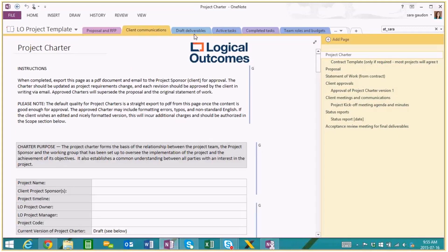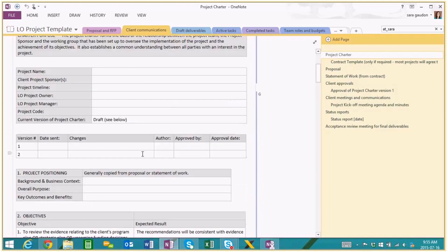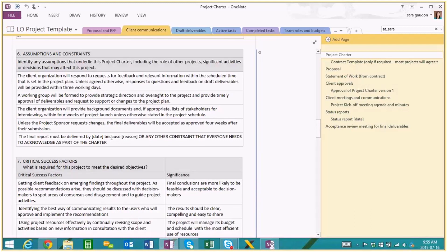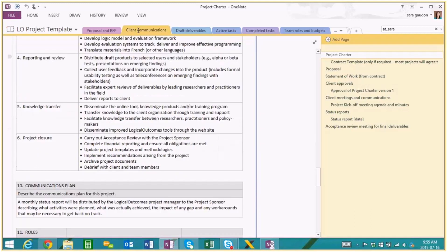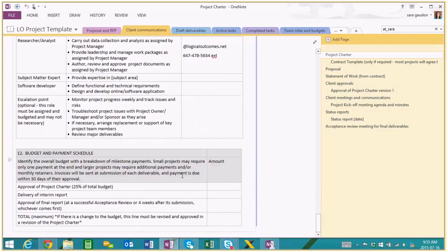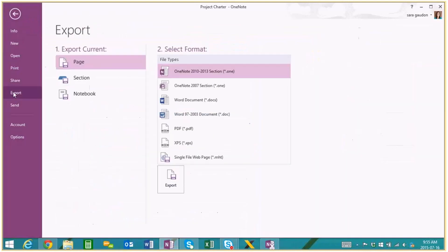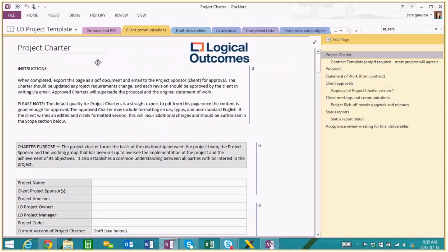The client communication section is where we keep any records of correspondence and also our contract — we call it a project charter because it has a little more detail than a contract might. Once we start a new project, we copy all this over into a new notebook and customize it. When the project charter page is finished, we export it as a PDF and email it to our client. Once the client reviews it, they might email back with a confirmation, and we save that email in this tab so we end up with a full collection of correspondence, approvals, and important documents all in one place.